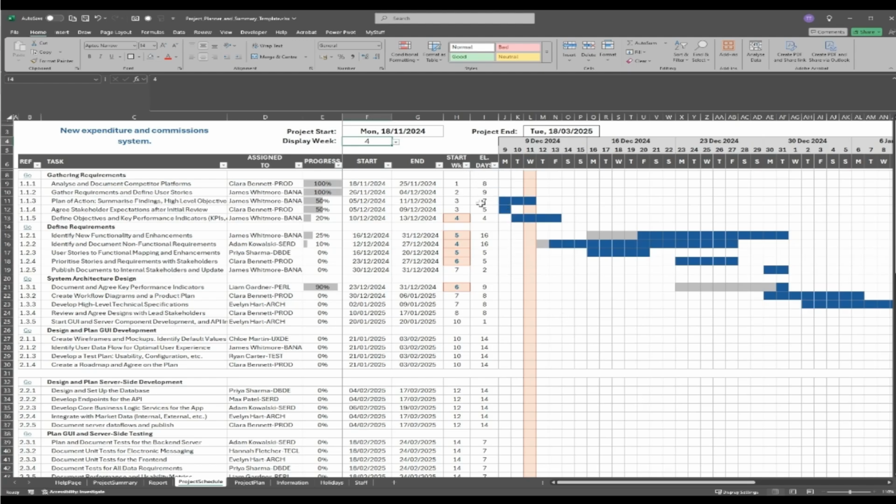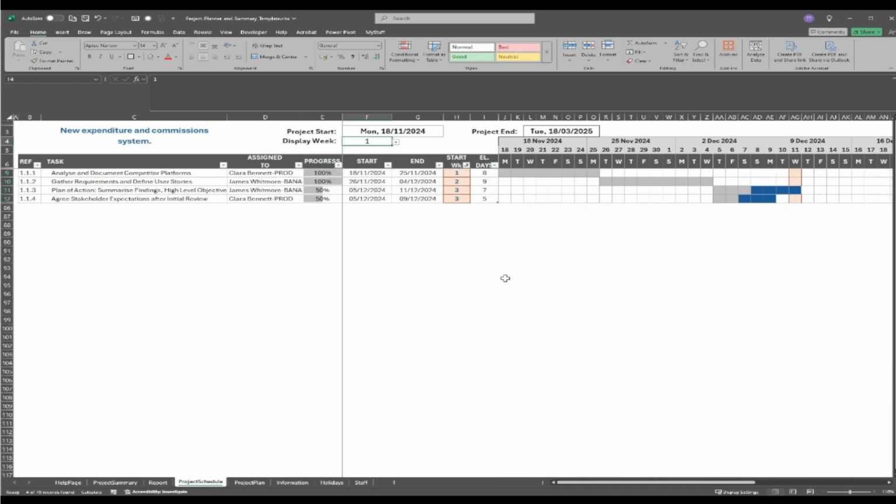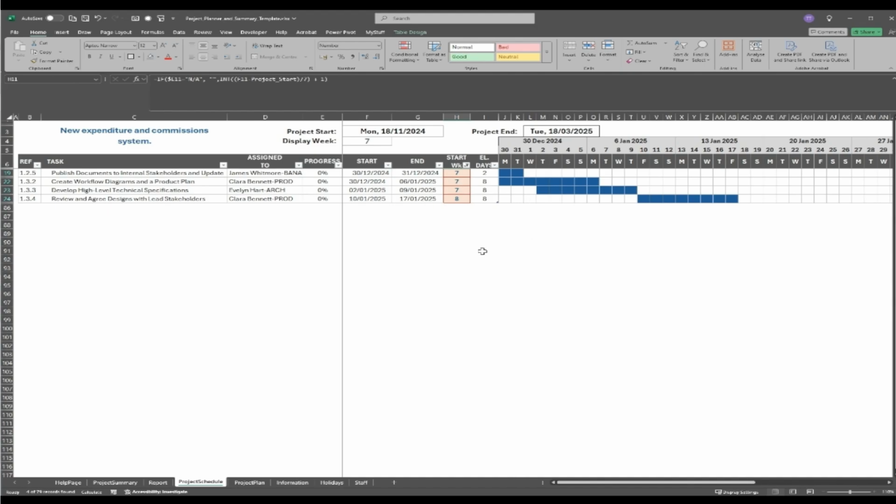Project schedule is a visual of the tasks and when they finish on the calendar. The individual tasks are listed and who they're assigned to and the percentage done. It also provides you with the shortcode for the role, just for information, and you can select the different weeks to see who you are. By using a filter, you can tidy up the view and see the individual tasks. So if I use a drop down and go to week 7, for example, and refresh the filter, it now shows me the tasks. It also shows you 2 weeks additionally to what you've selected.